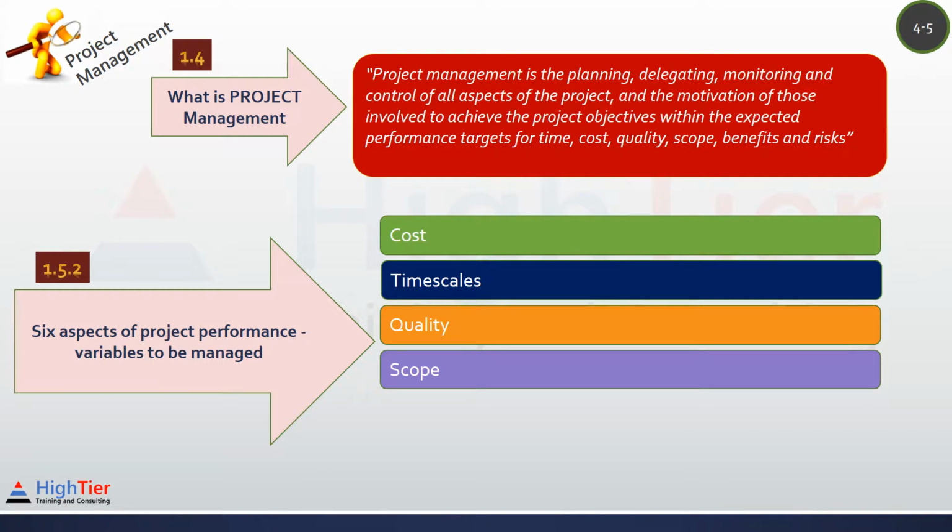Scope. Exactly what will the project deliver? The customer may assume that, for instance, a fitted kitchen and or bathroom is included in the price of the house, whereas the supplier views this as extras. It is important to understand what is and what is not within the scope. The project manager should take care not to deliver beyond the scope, as this is a common source of delays, overspend and uncontrolled change, scope creep.